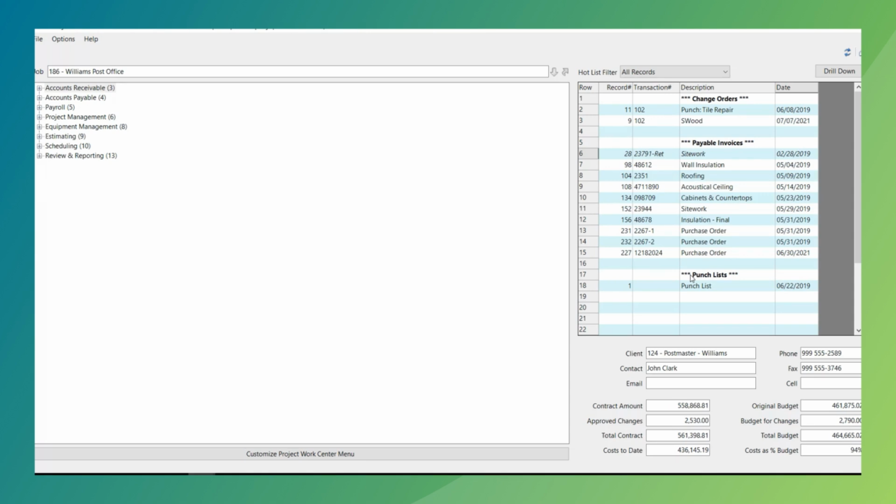So accounting does not have to stop their day-to-day processes. The only thing they have to do is go in and click a box to say, hey, this doesn't look right, can you please review this, especially if a job is going over budget, or we get a message similar to the purchase order that says this exceeds the original scope or budget amount. Go ahead and put it on the hot list, so that a PM can come in and take the time to review it.